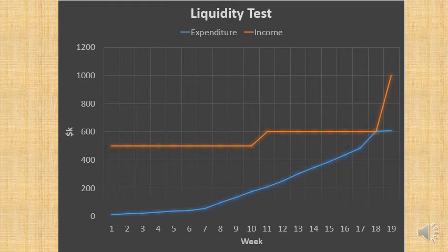So ideally you don't want to have too big a gap between the orange line and the blue line, because that means you're actually losing out. There's an opportunity cost you're paying, where you could be using that capital elsewhere in other projects, in other investments as well.